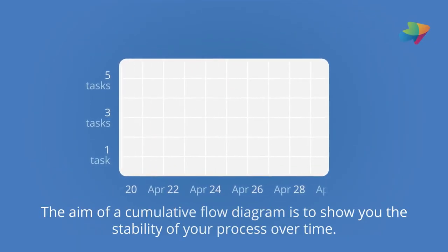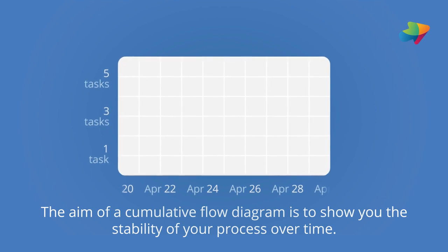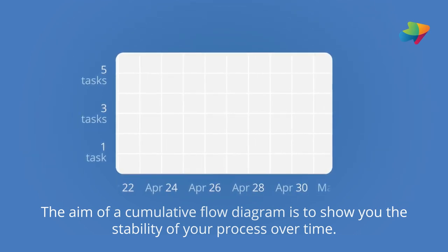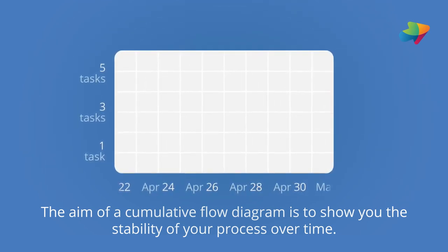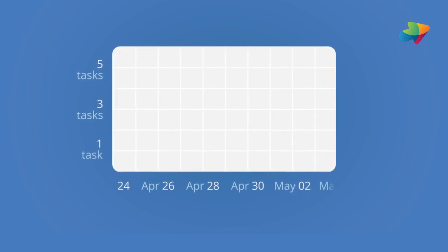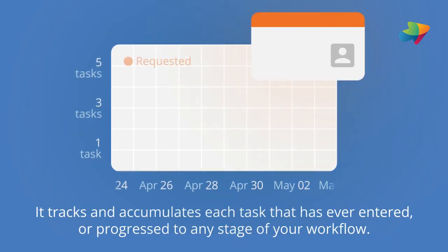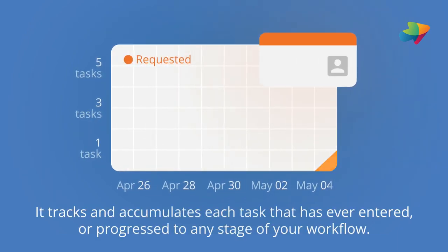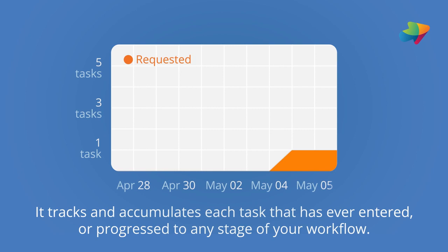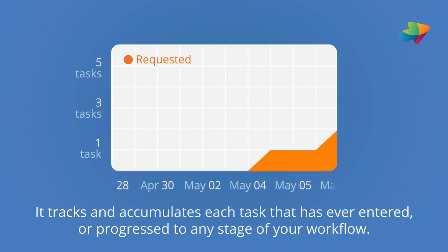The aim of a cumulative flow diagram is to show you the stability of your process over time. It tracks and accumulates each task that has ever entered or progressed to any stage of your workflow.